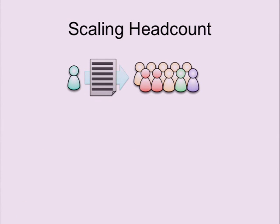Now let's go to scaling and headcount. Scaling headcount is actually an issue if you try to apply the Scrum process. And this is our little Scrum team here. We learned that the size of the Scrum team is actually crucial, and there's an upper bound. So we typically work with 6 engineers, 2 testers, one of the engineers also being the architect of this group. There's a Scrum Master, maybe external or part of the team. Maybe 10, but 10 for us is the maximum amount.